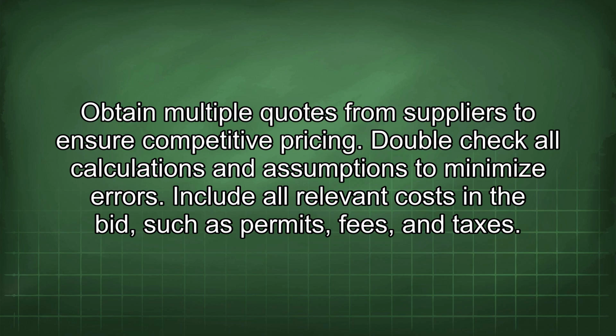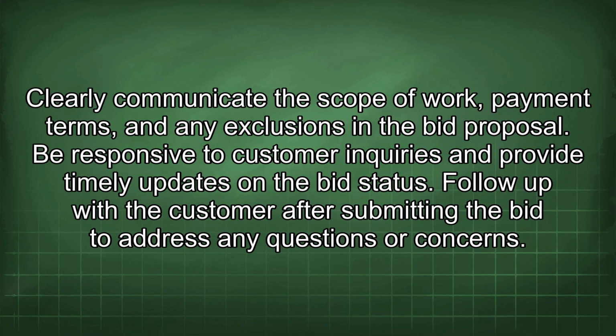Include all relevant costs in the bid, such as permits, fees, and taxes. Clearly communicate the scope of work, payment terms, and any exclusions in the bid proposal. Be responsive to customer inquiries and provide timely updates on the bid status. Follow up with the customer after submitting the bid to address any questions or concerns.